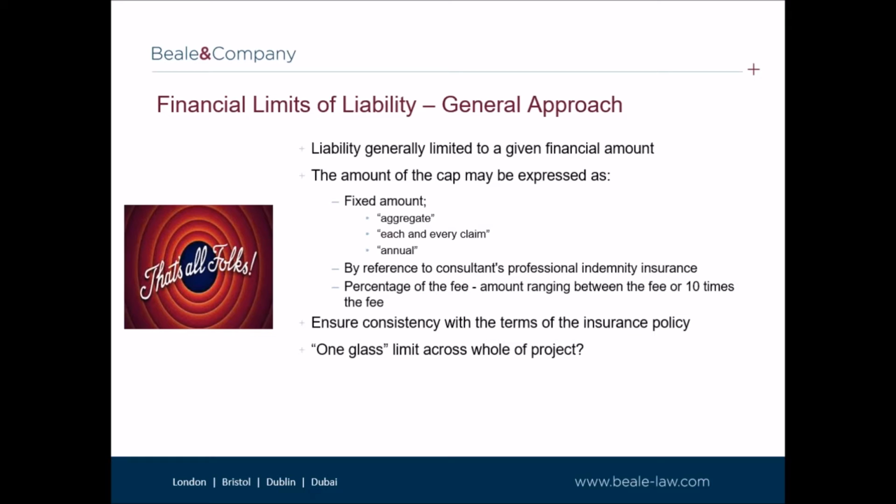The risk of a per claim or annual limit means that a number of claims could be commenced up to the limit across the whole of the project. It goes without saying that a financial limit of liability clause should mirror the limit of indemnity of a consultant's professional indemnity insurance.